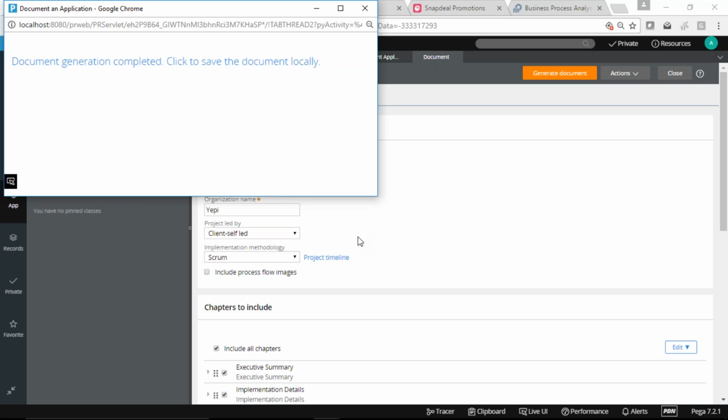Yes. Okay, so we are entering the information of sprint and project timeline, and earlier we also entered the information for iteration. It depends on the methodology. If you were going for waterfall, this information will not be there, because that is a very high level release. If you are going with Scrum, the iteration is the same as the sprint. With waterfall, this approach will not be there, so it will give you different information. That is, how many iterations or sprints it will take to complete the whole project.